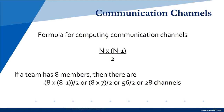Communication channels. We can calculate our communication channels. The formula is n times (n minus 1) divided by 2. If you had 8 members, then it works out as 8 times 7 divided by 2, which is 56 divided by 2, which is 28 channels. These channels represent the individual communication paths in your project.